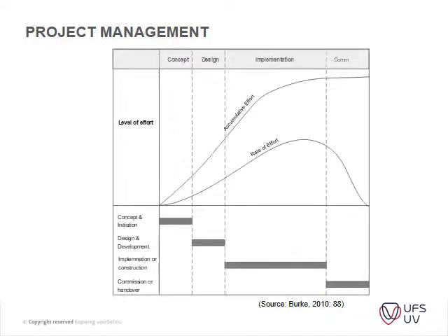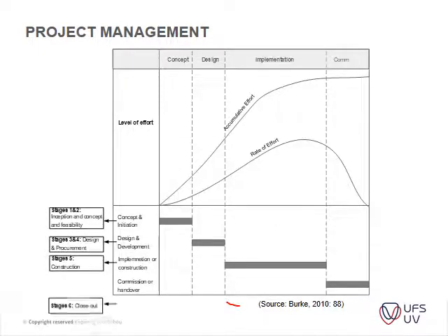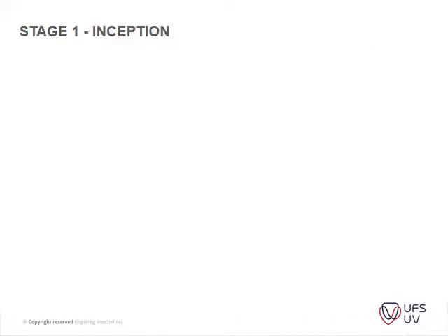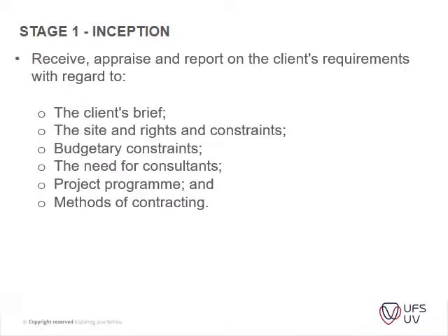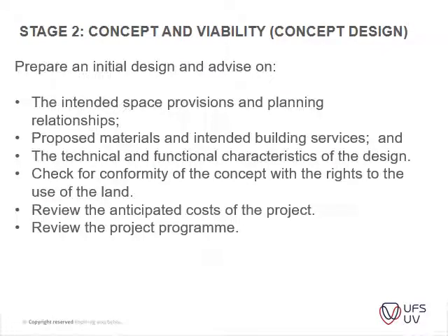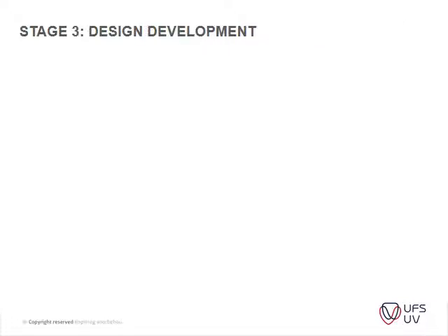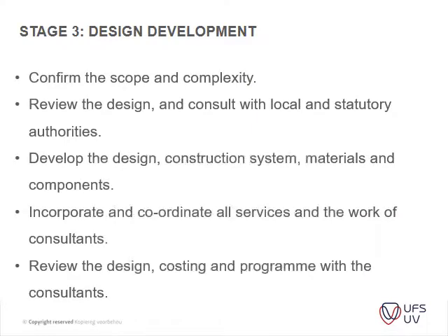So we've got our general project plan, and we've got our 6 stages up to our closeout, and then each stage has its different outputs from the architectural side, and all of this information influences what the QS can do. Same with stage 2, we have a basic design or your concept design where that is done. Stage 3 is where you actually start developing your design. What type of finishes are you going to use? It's basically just finalizing the design and starting to put it on paper.